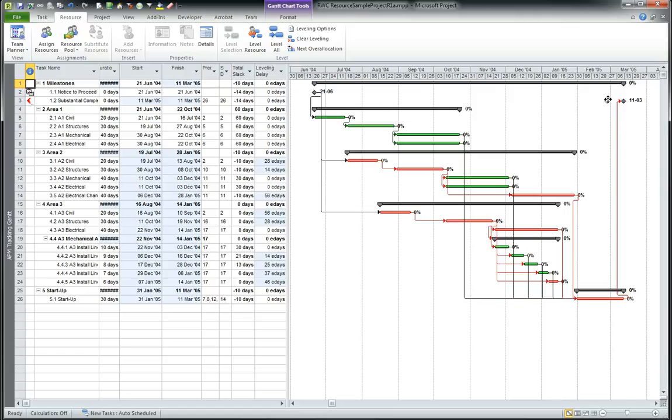If we're trying to recover that 2 weeks of delay, we need to find where the critical path is. What activities do we have to shorten? Unfortunately, in addition to resource leveling, this project schedule also includes variable calendars and, of course, a deadline. And these can affect the usefulness of total slack.